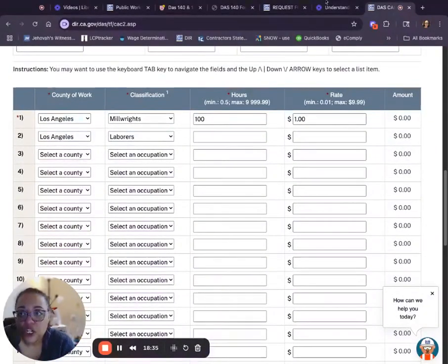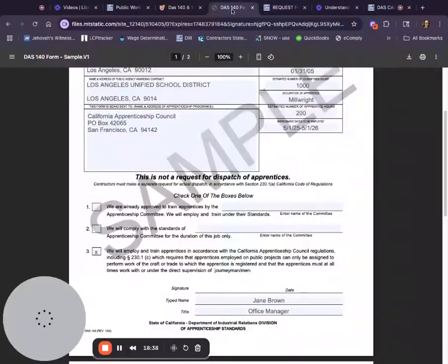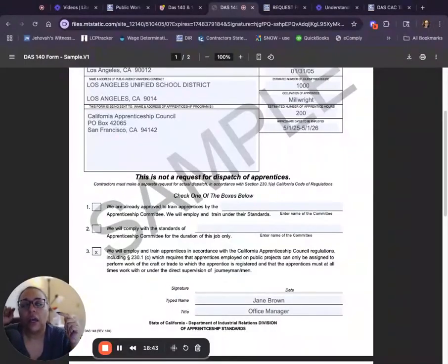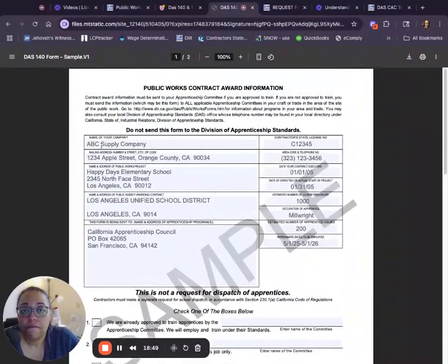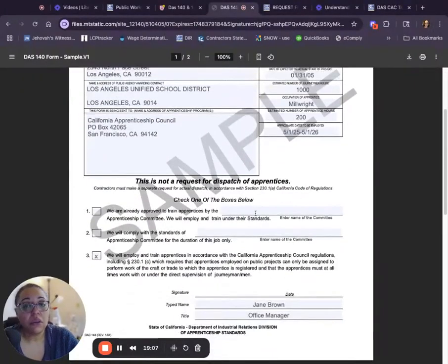So when they say the California Apprenticeship Council, I'm going to go back to that form. California Apprenticeship Council, that's the CAC. That in your head should click, oh, their training goes to the CAC. I need to set my calendar so that by the 5th of the month or sooner, I'm calculating the hours and sending ABC Supply Company an invoice to say, this is what you owe the CAC for the hours that you had workers working on this project. Because you said you're not going to pay them to the union, not always, not for once. So you're going to pay it to the CAC, just the training. So that's what all those boxes stand for.